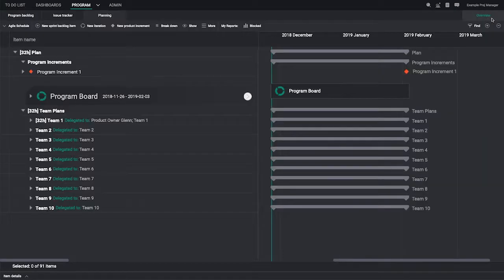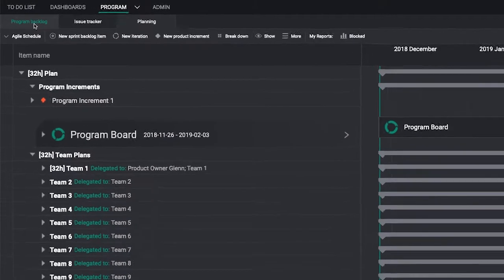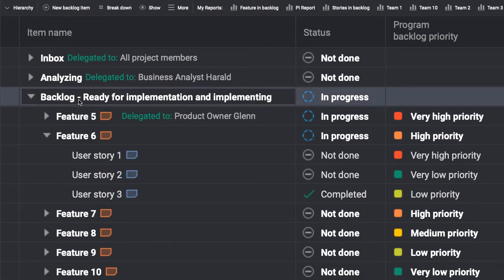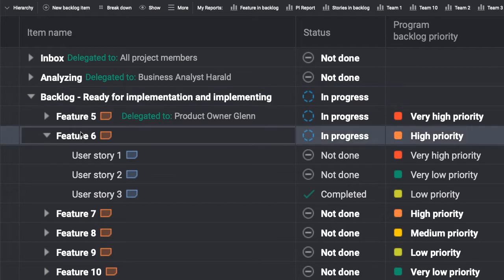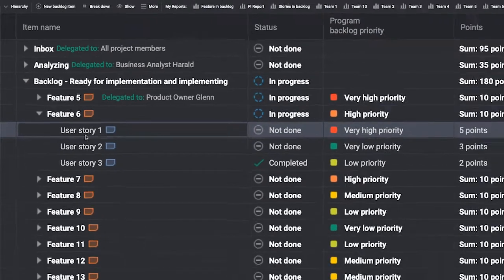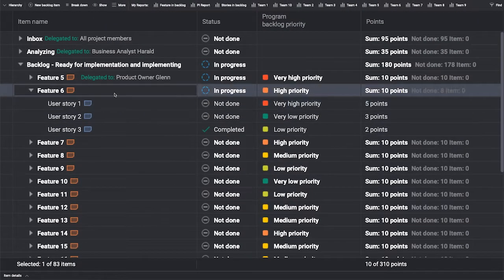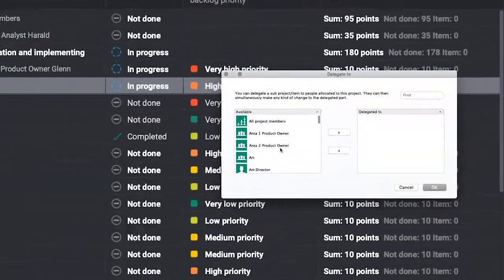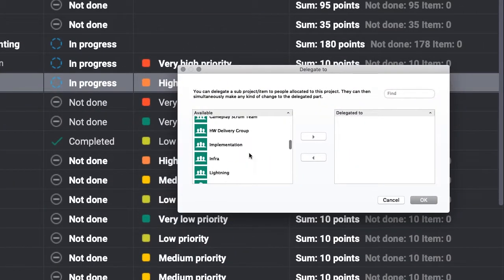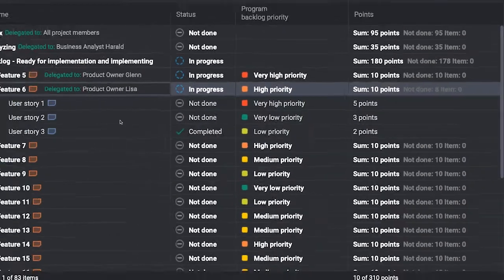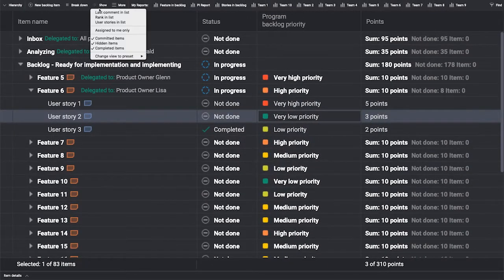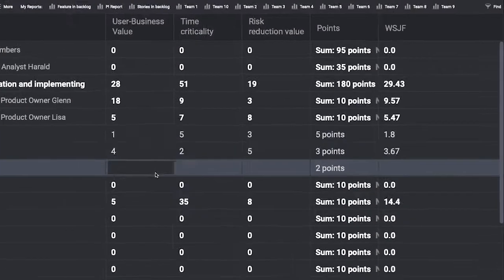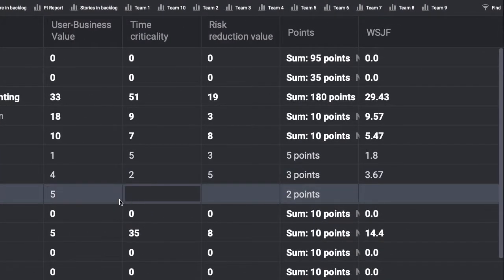Use HanSoft's product backlog view to structure your joint program backlog by product increment objectives and teams. Product owners get a great workspace for managing their backlogs together. To backlog items, they can apply SAFe's recommended weighted shortest job first prioritization.